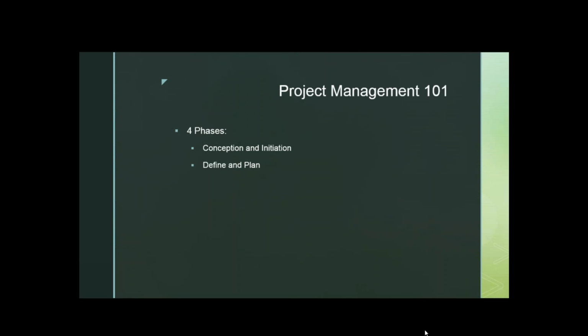We kind of talked about a timeline and benchmarks, so you can talk about what milestones are good. Are there some things that have to be done before others? Is there a sequencing involved where you can't move on to this step until you've already completed some earlier ones? You might want to lay those out and specify that too. And also the important thing to put in here, which I think would go in the project charter too, is who's authorized to make changes. And when you have changes, they need to be documented and everyone needs to be informed. That would be part of your communication plan.